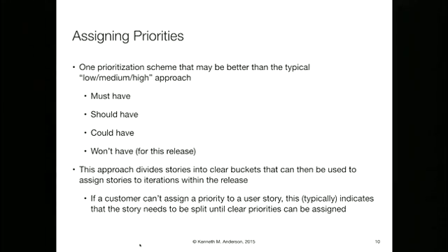It's too high. It's one of these epic stories that's easy to talk about at a high level, but once you start really asking what it's all about, it's clear it just needs to be split and split and split. If you have a story that has tons of questions associated with it, it just means you don't understand it yet. And you need to have way more conversation. And as a likely result of that conversation, oh, you mean this and this. Oh, you mean this, this, and this. Right? And slowly but surely it will naturally split into things that suddenly have clear to-dos, clear priorities, clear estimates.